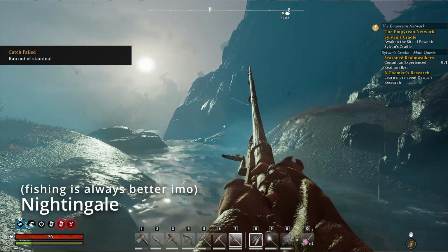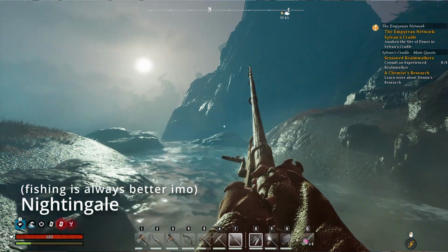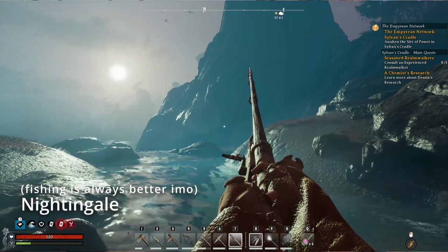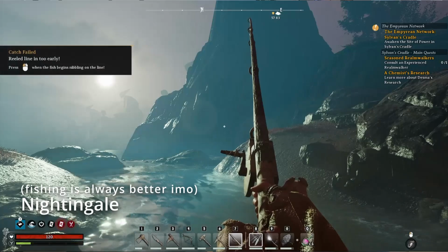When you're investigating those new things that come into your backlog, there's a couple questions you can ask yourself to determine, is this something I really need to include in my game, or is this just scope creep? The first one of these questions is, does it actually make the game better? If you look at this objectively and you look at that task and you've defined what better means, does that idea make the game better? Or does it just expand its scope? Because that can be a really key differentiation between something that is bad scope creep and something that might be an idea that you should incorporate in your game.